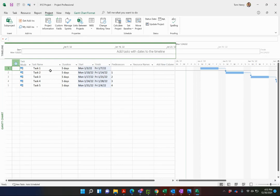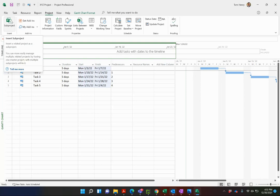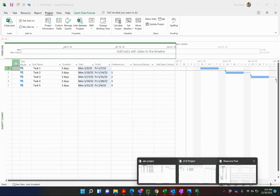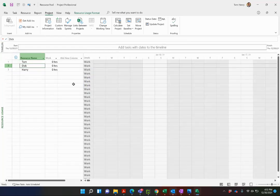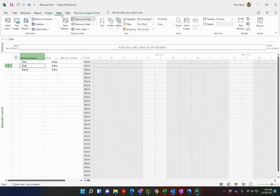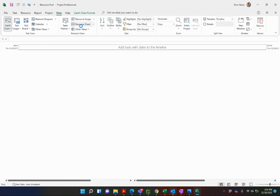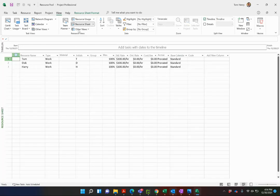To do this you'll need to build out a third project schedule that is going to be just for your resources. I actually built this out earlier so you can see here if I go to my resource pool project, and I'm actually going to use the resource sheet view.